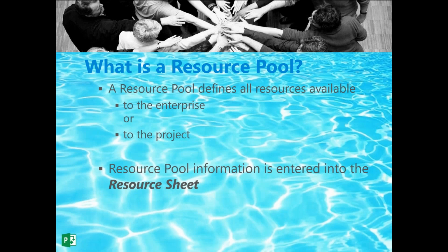A resource pool identifies the resources that are available. Resource pools exist at two levels. They're the resources that are available to the entire organization and the resources that the project manager has negotiated for use in his project. The term resource pool is a general term in project management. You won't see that term referenced in Microsoft Project. In Microsoft Project, resource pool information, or our availabilities, are entered into the resource sheet.